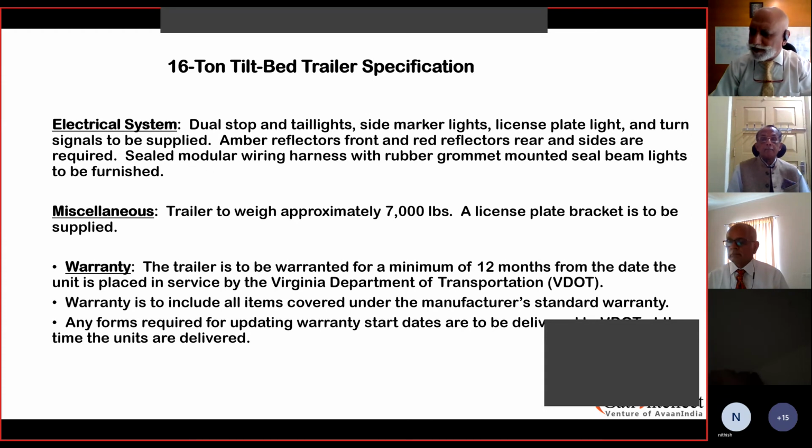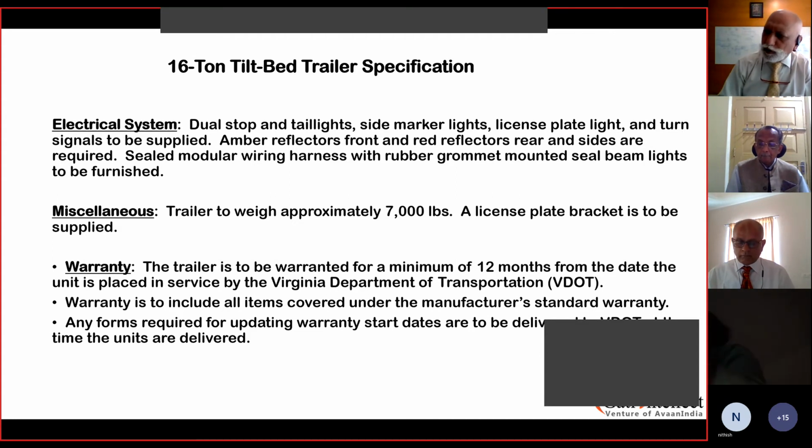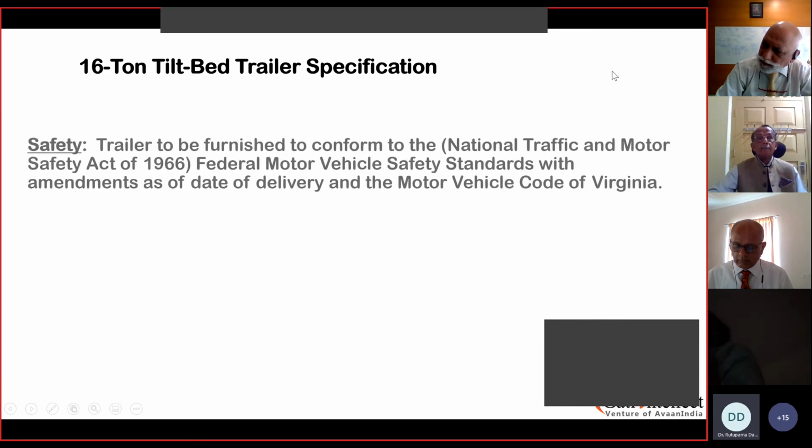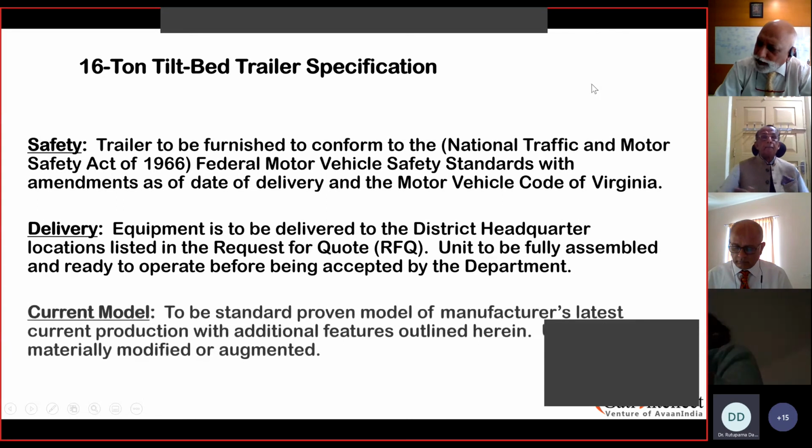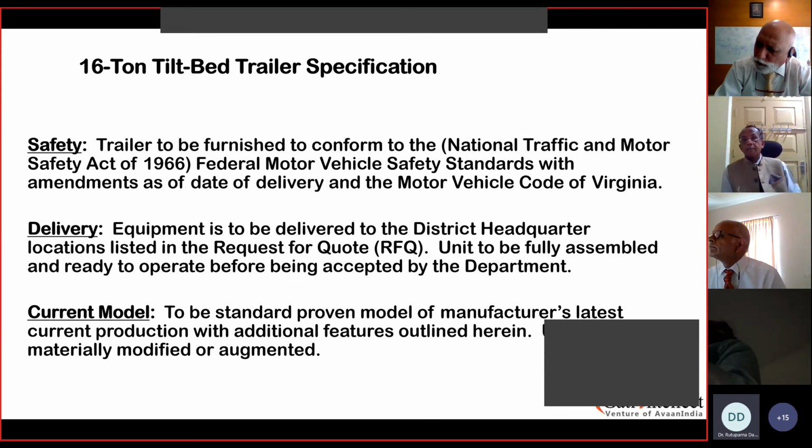You have to have those emergency lights available, and you also always have to have a lead ahead and a trail behind to see that the cargo is safely escorted. So all those guidelines have been fairly well defined for the contract, for the vendor to properly execute the contract. The warranty part is also defining that the equipments which are used are to be approved by the local transport authority.